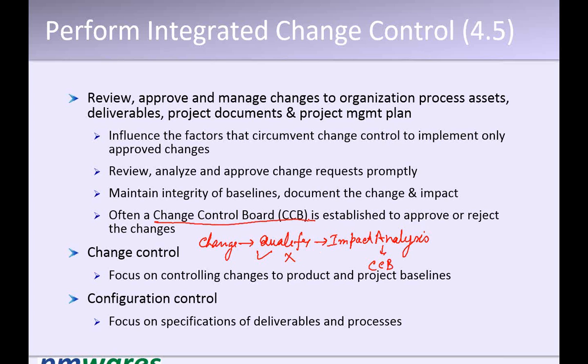It depends upon what type of project it is, and what kind of people can decide whether the change can be taken or not. The job of the Change Control Board is to analyze the benefit of the change and the impact on the project, and then take a call: should we accept it or reject it?